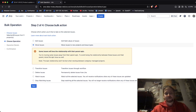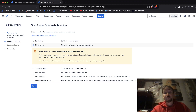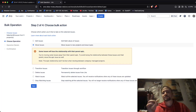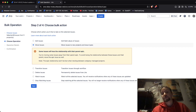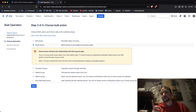I have Move Issues selected, and it's saying first of all some issues will lose the relationship with their parent epic. You're moving some issues away from their parent epic. To avoid losing that relationship, move the epic issue as well. It says the epic relationship won't be lost when moving between company-managed projects, but it gives you that disclaimer — some issues will lose the relationship.